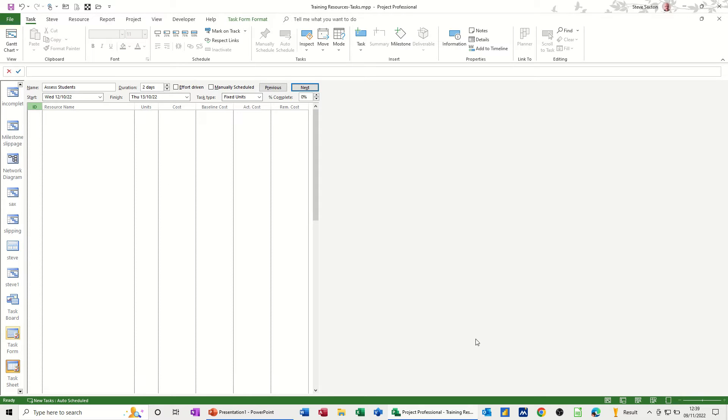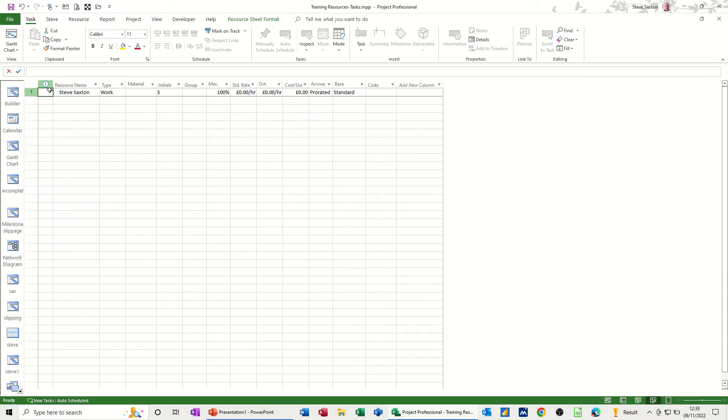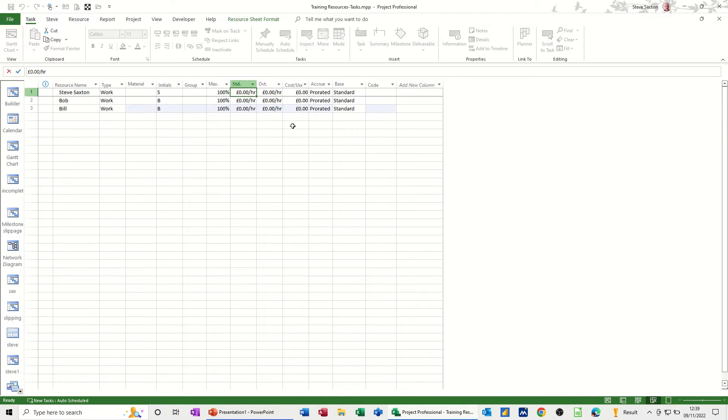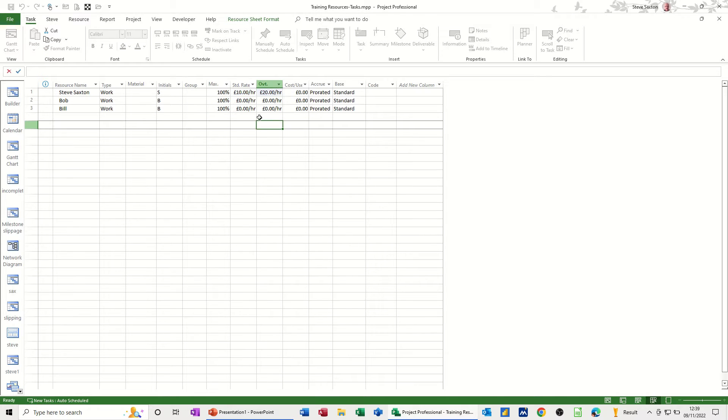So if I just go and create a resource list and add one, I'll just add, I've got myself there, I'll add Bob and Bill, and let's put those, let's put everybody at £10, £20 over time, pull that one down.